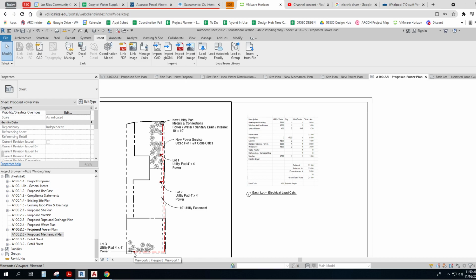And the box would just be anywhere near the residence. Yeah, and you know what? Electrical is really easy to run. You can run it 2 or 3 feet deep. Any good landscape contractor has a ditch witch that can cut the trench and drop the electrical line in and run power in the PVC for $500 to $1,000 and wire it in. That's the easiest of all the things to do, is run the power cord to the tiny house. So that's good.